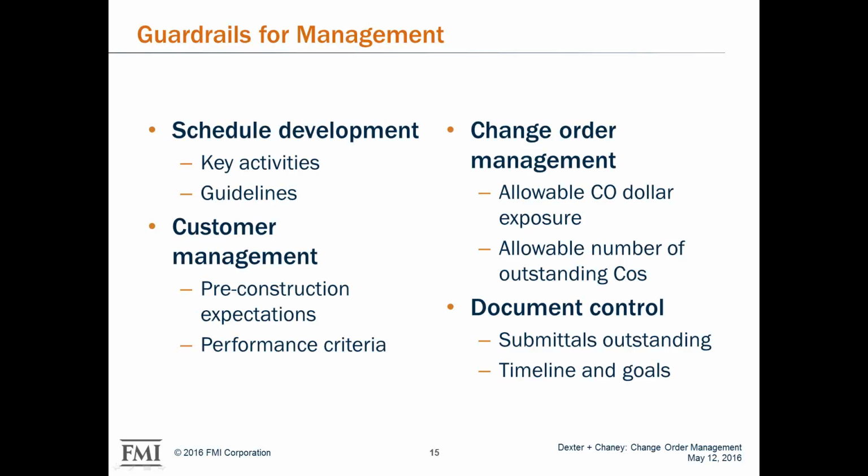Customer management: what are we doing in pre-construction to set expectations? What's our performance criteria? Is the client well aware of what we expect, and are we aware of what they expect? Change order management: allowable dollar exposure, and allowable total number of change orders. Like, how many are we going to have out there before we do something about it? And then document control.